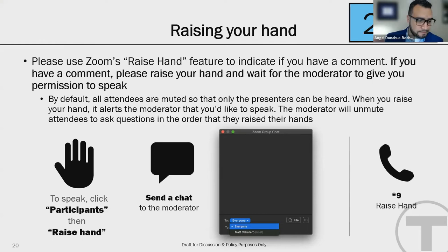Yes, I believe it is in regards to our inaccessible bus stops that are being repaired. So in 2017, the MBTA surveyed all nearly 8,000 bus stops and determined that 273 were critical. Of the 273, they determined that 170 would be closed and the remaining 103 would be reconstructed. As of roughly 4 or 5 months ago, 84 of those highest priority stops had been fully reconstructed, with a handful still under construction, expected to be completed in the near term, and with designs proceeding on nearly 30 additional of the critical stops.